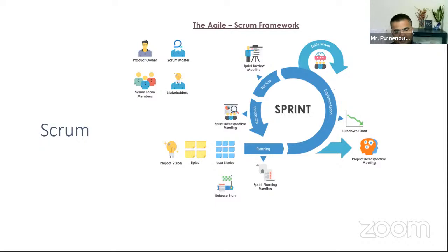The second way is I design a solution, I implement it, but we did not give enough time to test it because our implementation time was too much. We did not factor in the people who are on leave, right? So that becomes our retrospective. So the retrospective helps us understand what was wrong. Did we take too much work to do? Because it is only 4 weeks for us to implement, and we took work which took 3 weeks to implement, and we never had enough time to test it.